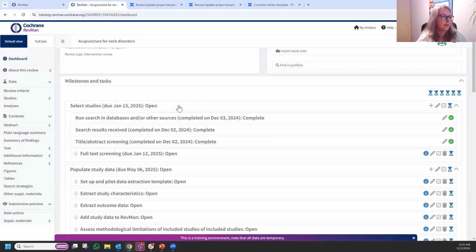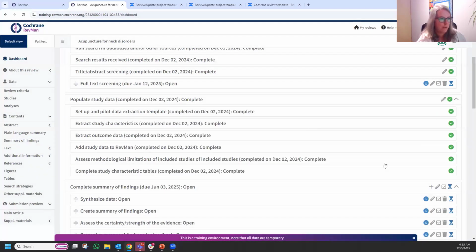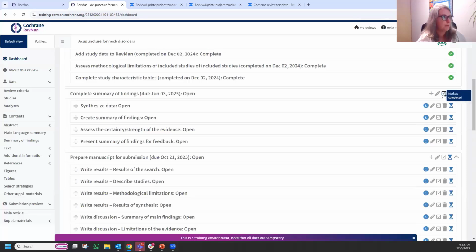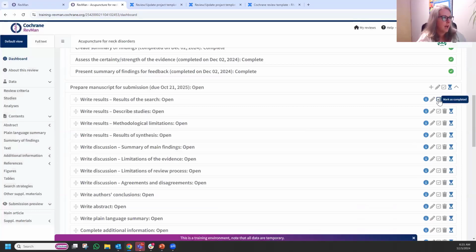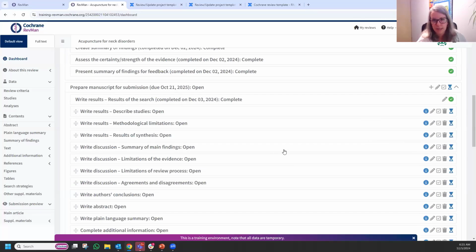So please do have a look in your review, check on the due dates, and adjust them for the work that your author team has already done, completing given milestones. For example, say we have all of our study data already in, we mark this milestone as completed so that all of those tasks are marked as completed up to where we are. Say that we're currently working on writing up our manuscript and we've completed our results, but we are writing the rest of the sections now. And so you bring these milestones and tasks up to date with where your author team is.